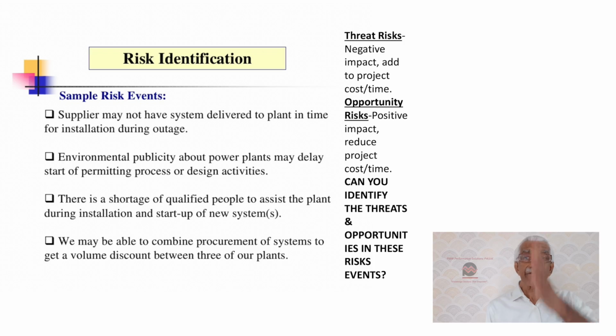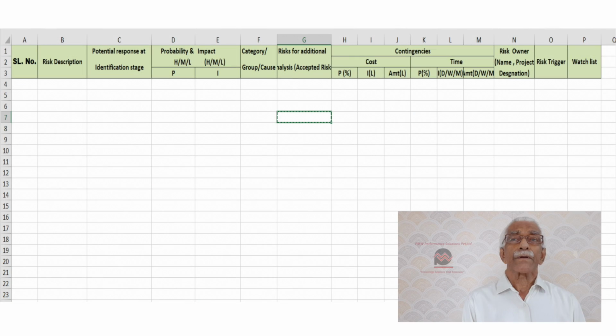Now, these are all entered in the first column of the risk register, which is a concept I'm now bringing up, under risk description. That's the first column in the risk register. And at the same time, writing out the potential strategy to handle that risk. It may be eliminate, or it may be transfer, or it may be exploit or enhance for positive risks. It may be accepted category. So all these are written down immediately and later may be reviewed at the time of the analysis.